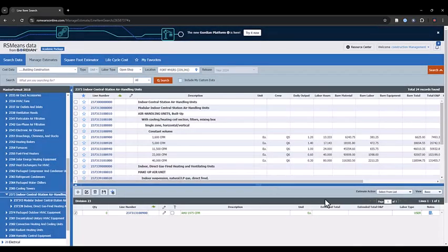You can see that for the material cost, this one has high variation among all the volumes. However, for the labor cost, they don't have much difference. Why? You see that when you install an equipment of 1600 CFM and an equipment with 5000 CFM, they don't have much difference between the two, because the labor cost is just about the same, right?